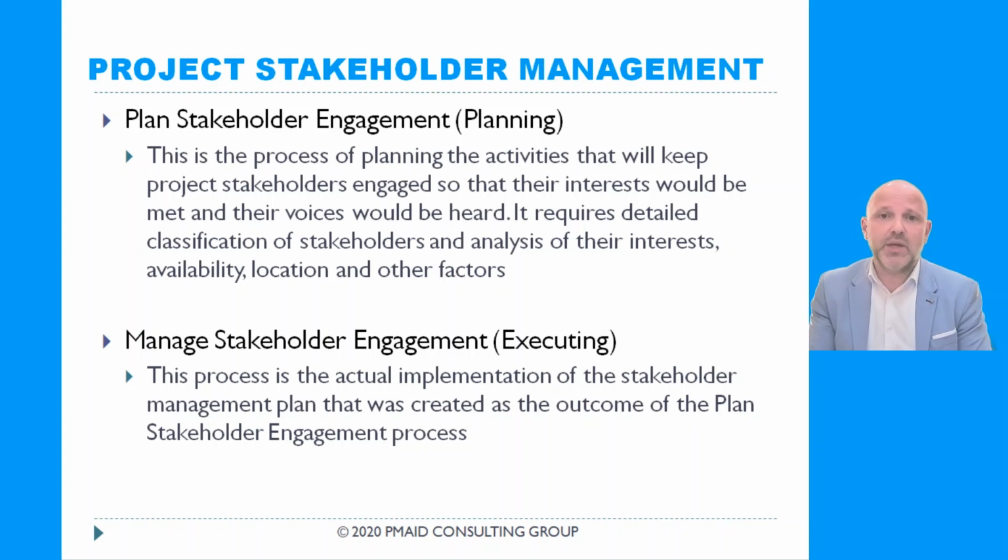I would say the key word here is availability. In so many cases, you know who your stakeholders are, you invite people to your meetings, but they are not available. And as a result, you cannot get their inputs. And the impacts are probably almost as severe as they would be if you wouldn't identify those stakeholders at all. So it's very important to learn about stakeholders' availability and to plan their engagement efficiently.